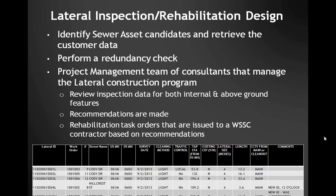Regarding the inspection and design process: we first identify sewer asset candidates and retrieve customer data for each lateral tied to a component, and research work order history to avoid re-inspecting recently rehabilitated laterals. WSSC has a project management team of consultants that manages the overall lateral construction program, responsible for reviewing inspection data, making rehab recommendations, and assembling construction task orders issued to a WSSC contractor. The chart diagram shown here is a typical layout of all laterals found on a particular main, with notes showing an ID change where a record showed a customer tied to a main line but the lateral was later found to enter a manhole.